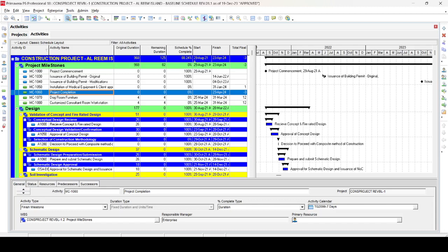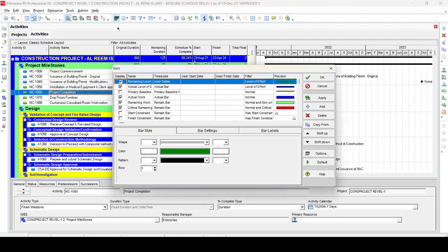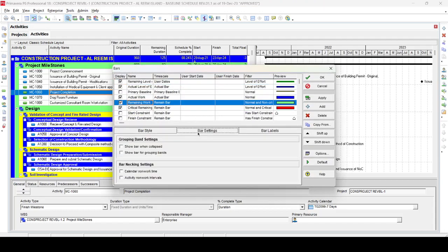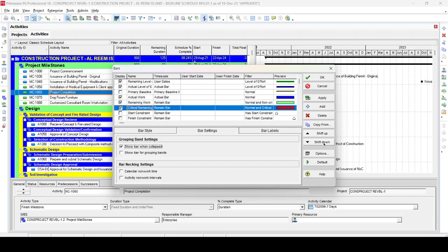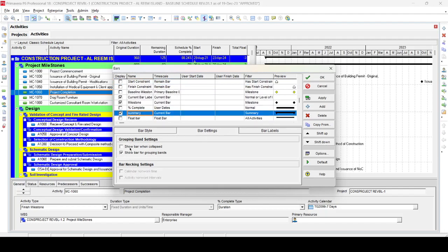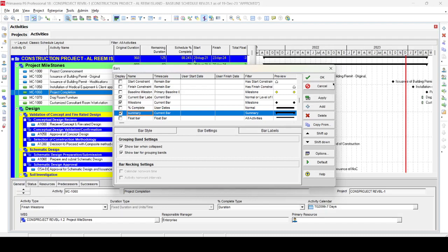Once that's done, you need to configure the collapse bar settings. Go to the Bar dialog box and select which bar you want to show when collapsed. For example, select the Remaining bar, go to Bar Settings, and check 'Show Bar When Collapsed'. Similarly, for the Summary bar, go to Bar Settings and check 'Show Bar When Collapsed', then press Apply.